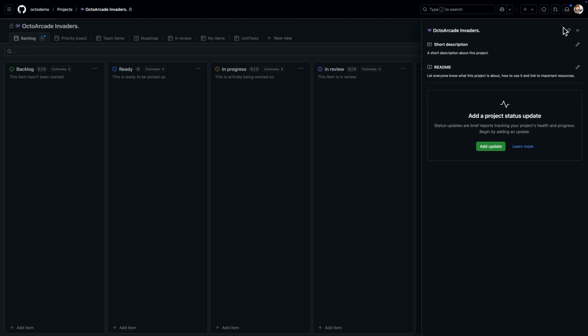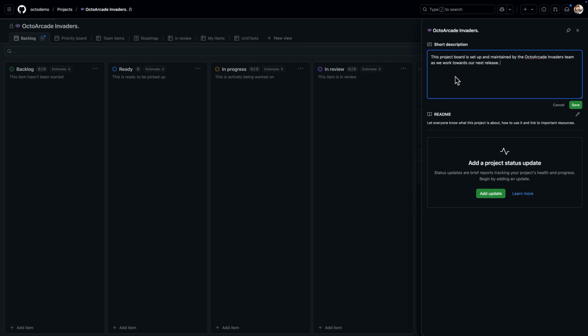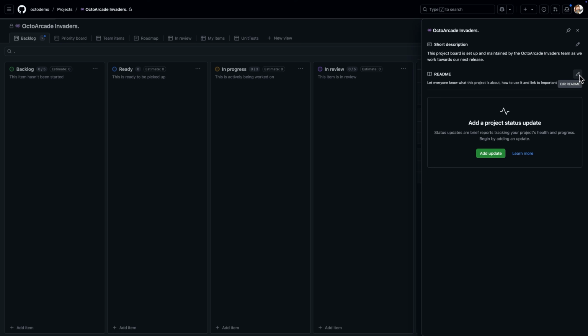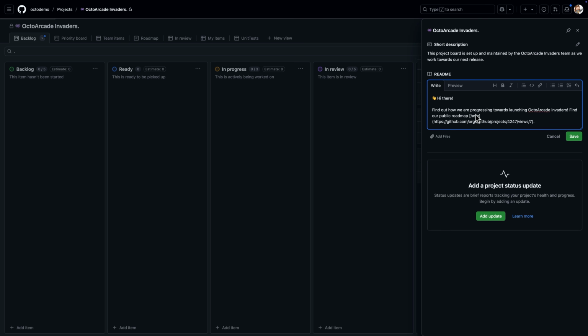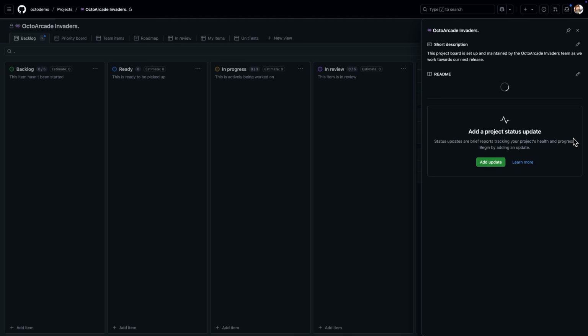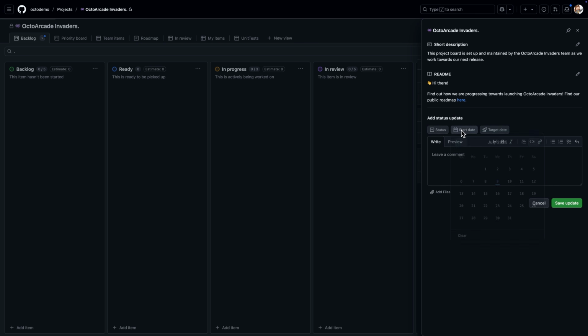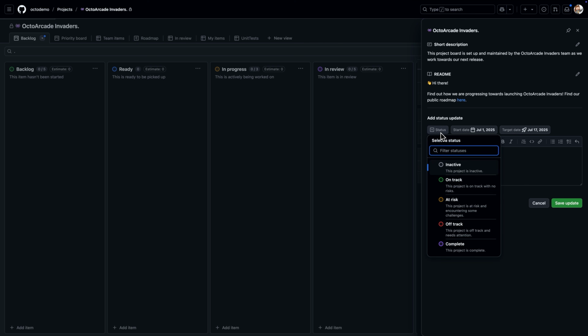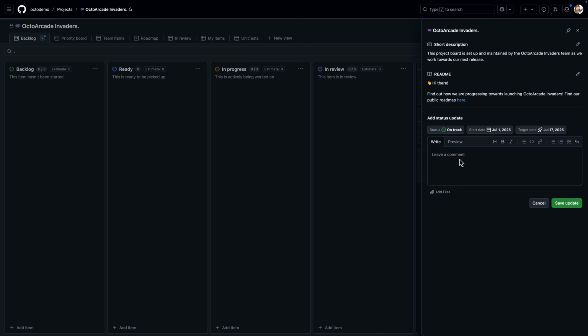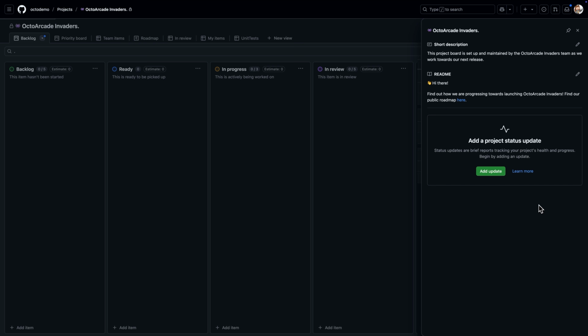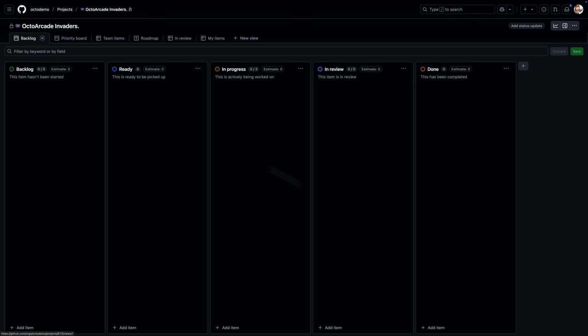Next, I'll update the project details, adding a plain text description to let viewers know what this project is about, and a more detailed README, which can include styled markdown with links, images, videos, and more. As my project progresses, I can even add status updates. Each of these summarizes our progress over a specific time period, letting people know whether it's still on track and any important updates they should be aware of.